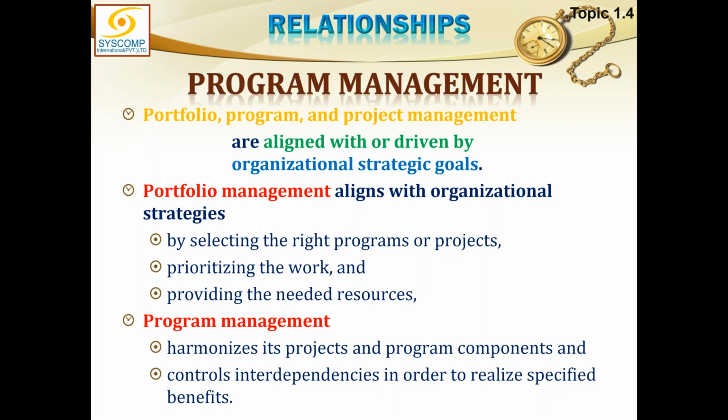Which projects or programs satisfy the organizational strategic goals better come higher in priority, and then providing the needed resources, that is, distribution of resources to high priority work. So, this is the job of portfolio, the three responsibilities: selection, prioritization, and resource sharing.